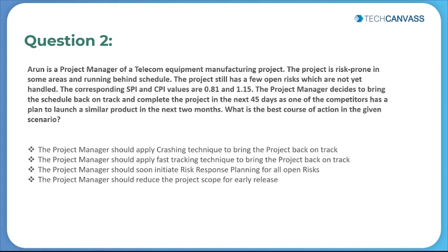Further, as the project is still under budget, the application of the crashing technique would not hamper the project budget to a great extent. So after reading and evaluating the question, the correct answer is option number 1, the project manager should apply crashing technique to bring the project back on track.